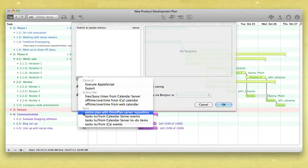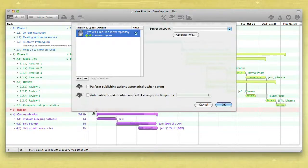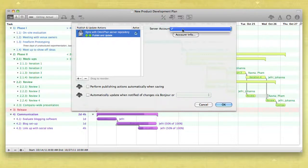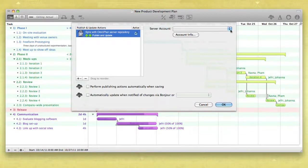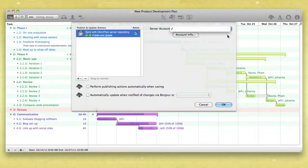Choose Entire Plan with OmniPlan Server Repository to publish all aspects of your project including tasks, resources, and calendars with a shared server.